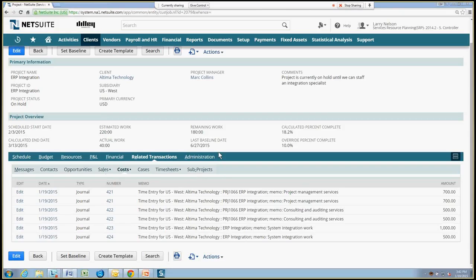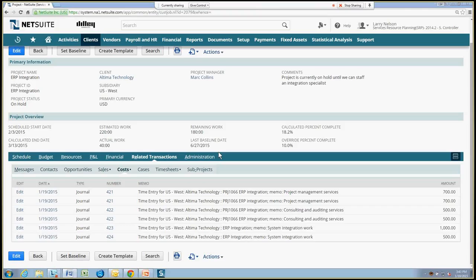So to summarize the benefits of timesheets, they're part of core NetSuite and are available via a browser, as we see here, or through a free NetSuite iPhone app. Timesheets support both native and custom workflow-driven approvals, which streamlines the time and effort for getting accurate project time recorded. And since timesheets are part of the overall services resource planning strategy, posted time immediately impacts the project P&L, and it's immediately available for customer billing.